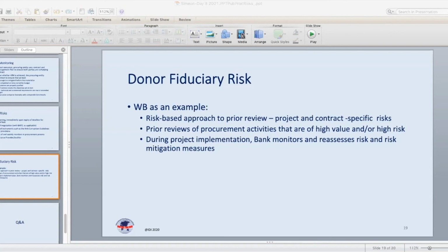Because in our case here, we have just completed an assignment where we are formulating a procurement risk management manual in our public procurement, and we want to slightly move away from the risk-based approach to activity risk-based, where we are assessing the risk for each and every activity for the entire procurement cycle, to be incorporated throughout the entire procurement process, which we are yet to roll out.